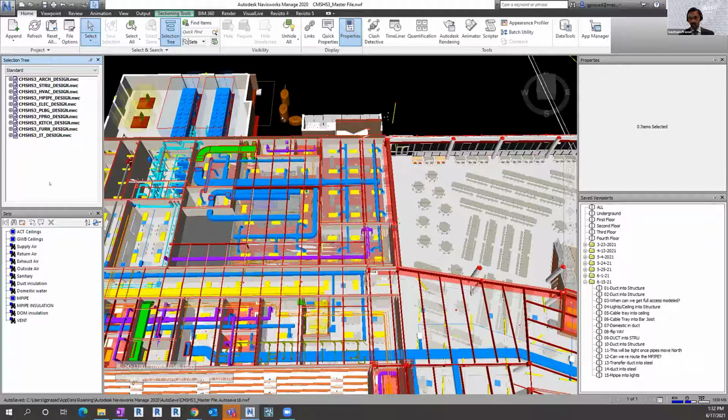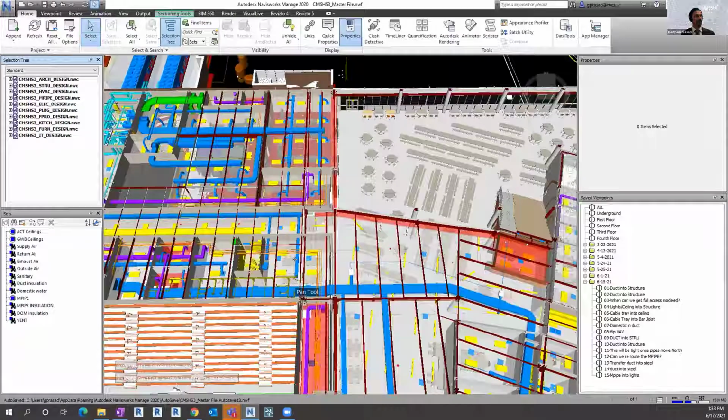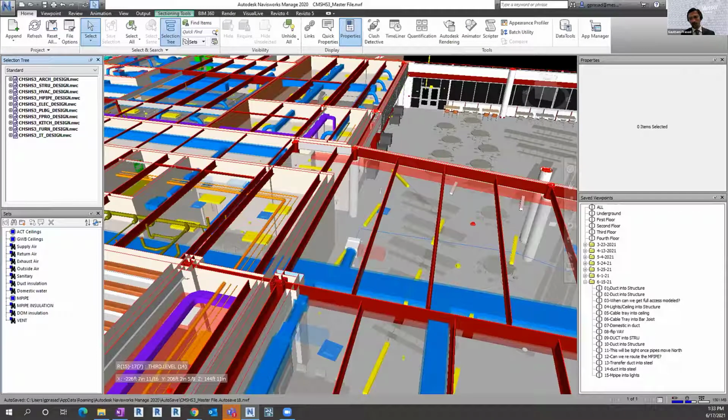So this is where I work with designers and we look at bigger stuff, right? Here's some big things we think are going to cause problems down the road. So how can we get the design to help feed into our coordination and construction process? And we started around 50% DD usually. And what I've done in the past is I go into Navisworks, I look through the models, I say, gosh, I don't like this. I'll create a viewpoint for it, as you can see over here. I number those viewpoints. I create meeting minutes. We discuss the viewpoints. I take notes on each one. After the meeting, I send them the NWD and the meeting minutes, and then they go work on it. So that's what I've done in the past. It works fairly well.